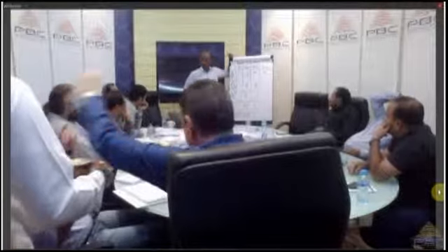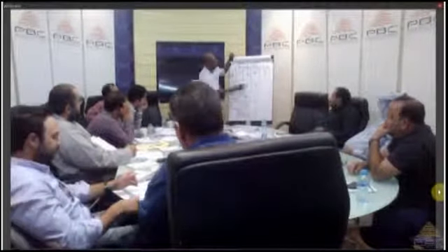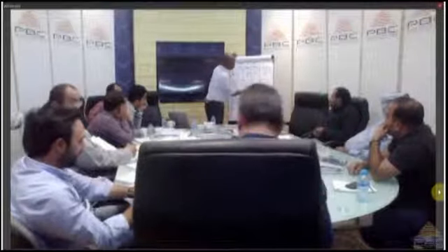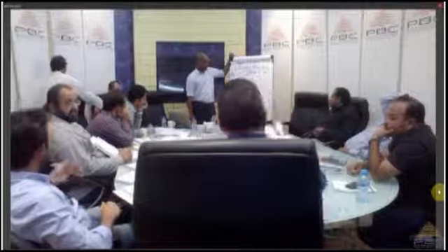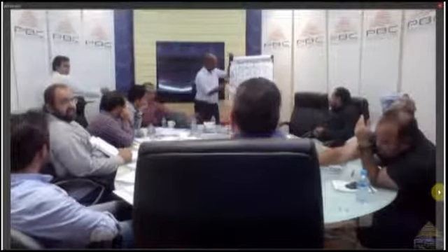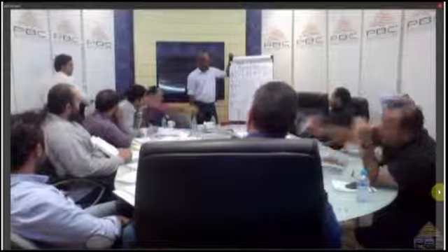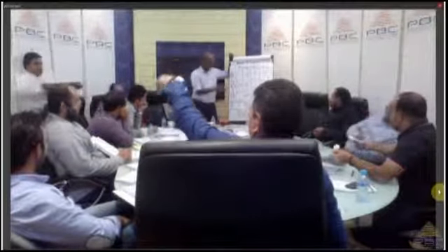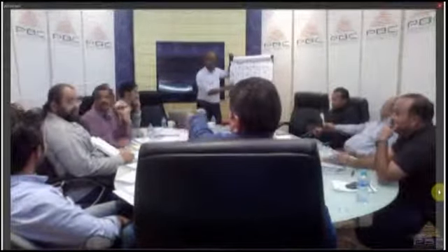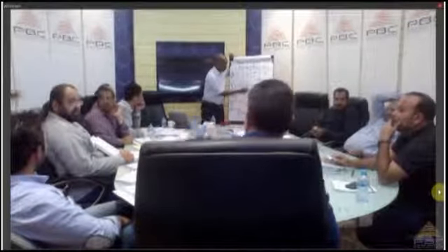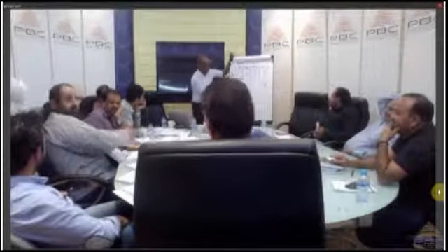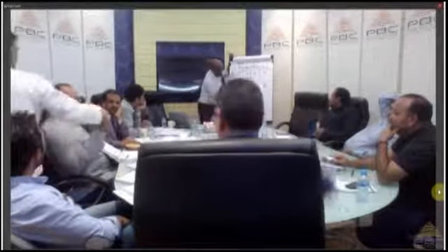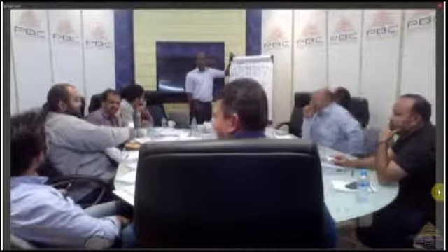To Osama. Okay, he will do that. Sorry, Osama is here. So, Osama, you're responsible to choose the menu, right? And we will also consult with Abdul Hamid. And here, once we choose the menu, we also do what? We inform Ihab. Why? Because Ihab, in paying the money, he is also responsible. He will pay the money. So we have to inform him what we ordered.